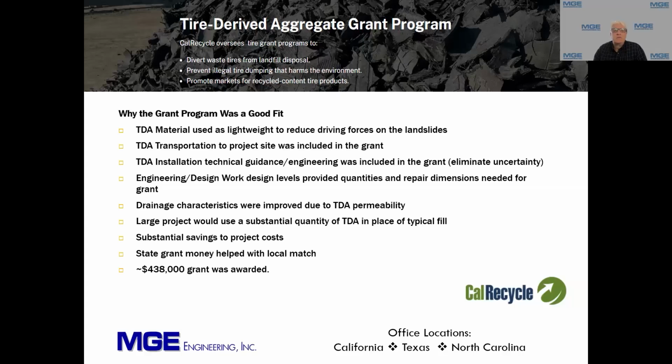The TDA and technical installation and technical guidance and engineering was also part of the grant. So we had technical specialists from CalRecycle that would help with our designs when we had any questions, and it was a valuable resource for these projects. We also had designs at about a 50% level, so we were able to generate quantities and repair dimensions that were used for the grant.